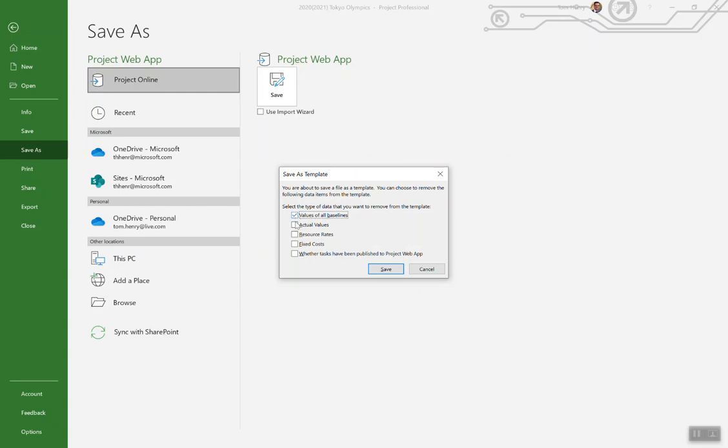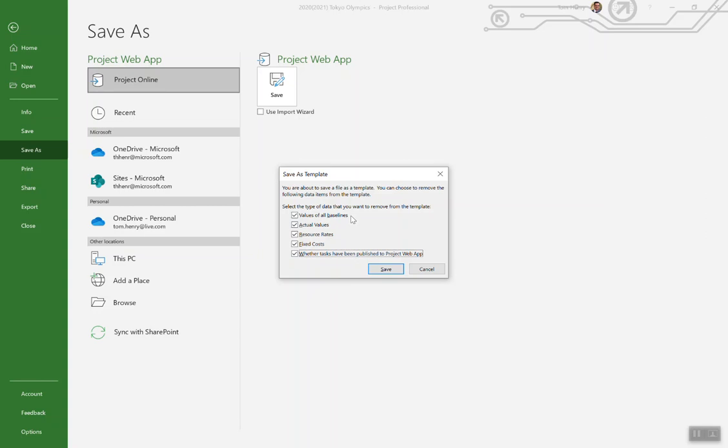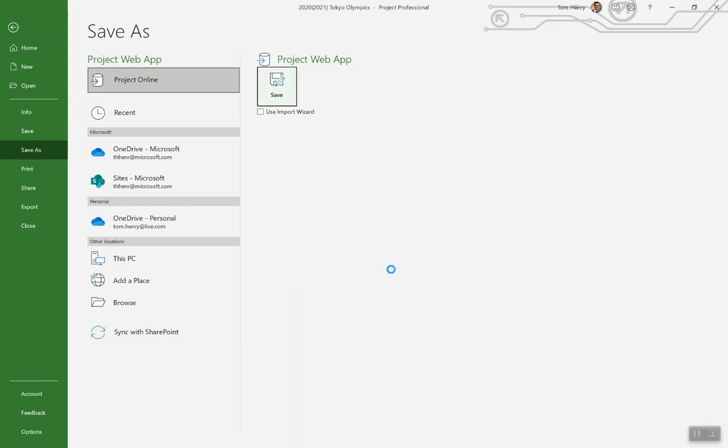I'm going to come in and remove all these values here. So I always just come and just remove them all. It will scrub your schedule for you, so if you baselined it, it's not going to have a template with a baseline because that would be silly. Actual values, you know. Did we start the tasks? How much did we spend on that particular task? Things like that. Scrub those values. Press save.